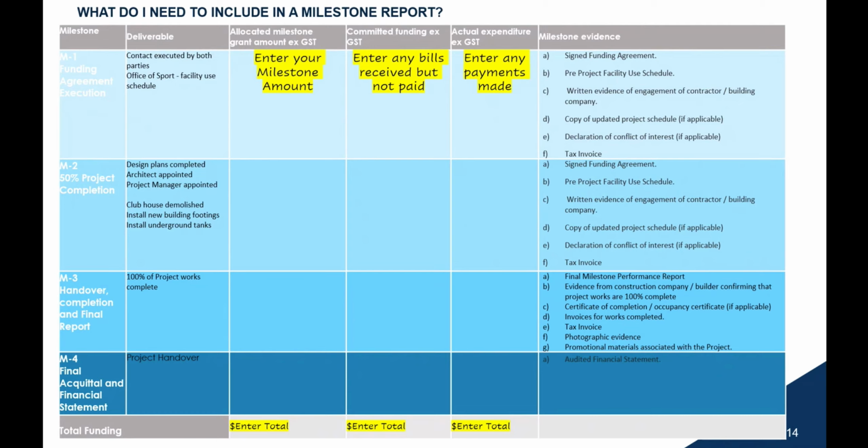Just want to clarify again that you do not need to provide a milestone report for milestone 1, and we also do not need invoices from your trades for milestone 1. We simply want to get the milestone 1 payments out the door to get you moving.